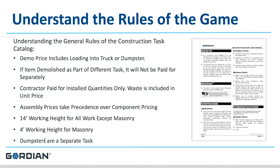Demo prices include loading the item into a truck or dumpster. If an item is demolished as part of a different task, it will not be paid for separately. The contractor will be paid for installed quantities only; waste is included in the unit price. If you need additional money for waste, you will have to include that in your adjustment factor. Throughout the CTC, there are assemblies at your disposal — for example, an assembly can include the conduit, the elbow, and all of the fittings; alternatively, you can price the conduit, elbow, or junction box separately. However, assemblies will take precedence throughout the contract.